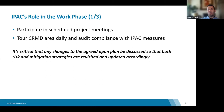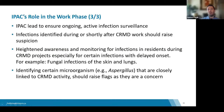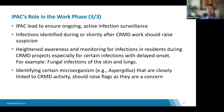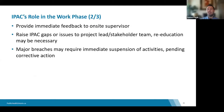As the IPAC lead in your home, you want to ensure compliance with all measures decided on during the planning phase and that all preventive strategies are properly implemented. To ensure compliance, you need to do some auditing by performing walkthroughs, asking staff in the vicinity if they've noticed any breaches in practice, and checking with cleaning staff — they'll notice if they're mopping and dusting more than usual.